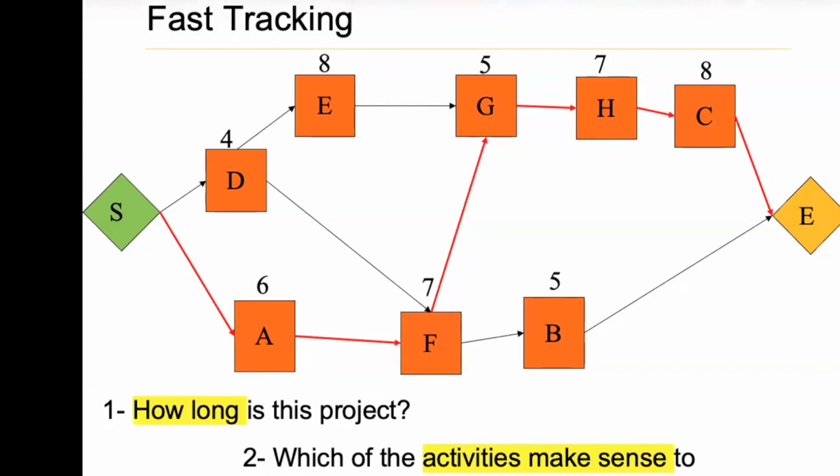So you look at the critical path, look at which one is less costly, and you can actually shorten more. I mean, if you spend $1,000 and compress the schedule by 1 day, well, instead of that, you could spend $1,000 on another activity on the critical path and maybe compress it 2 days.